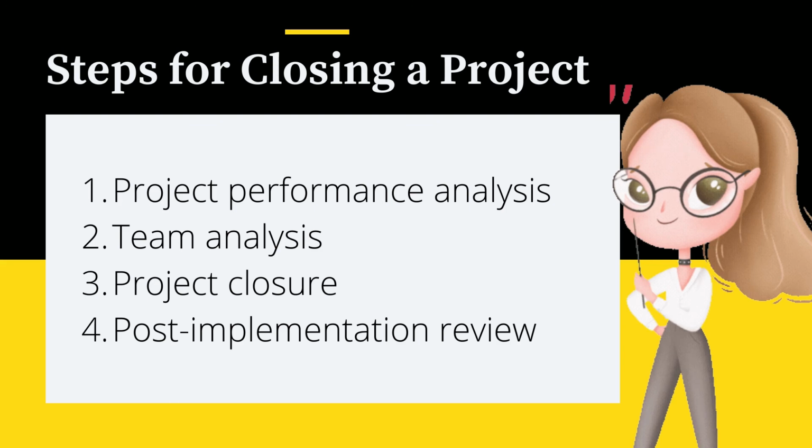Third, project closure. Document the tasks needed to bring the project life to an official end. This includes closing supplier agreements, signing off contracts, and handing in all the necessary project documentation. And the fourth, post-implementation review. Write down a formal analysis of successes and failures and resulting lessons learned and suggestions for the future. At the end of every successful project, you will learn that room for improvement always remains.